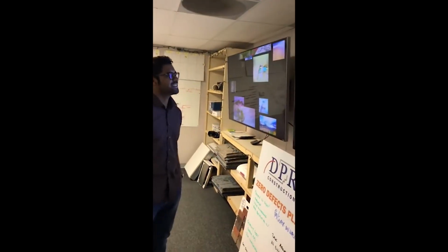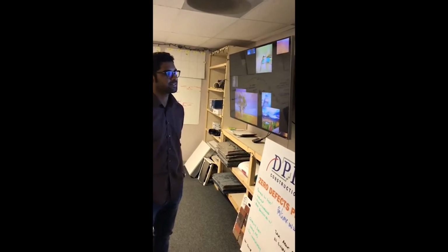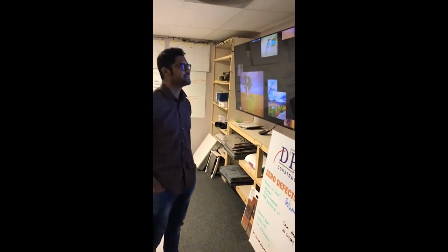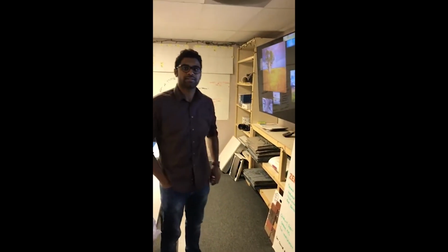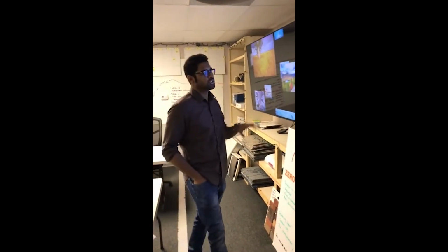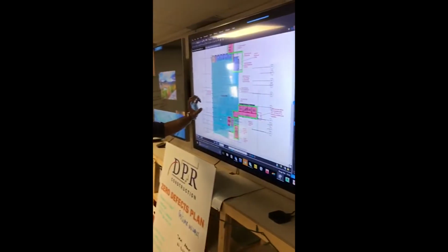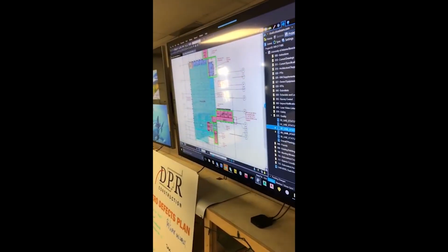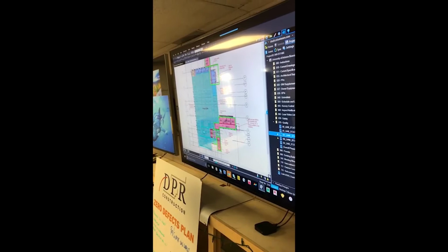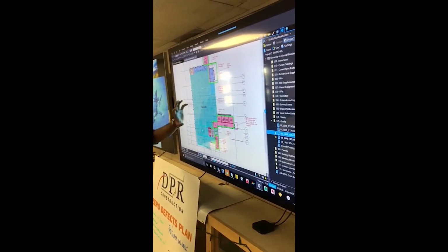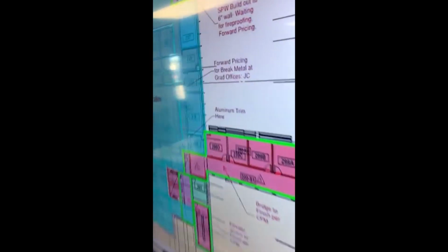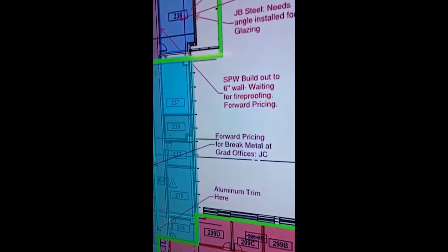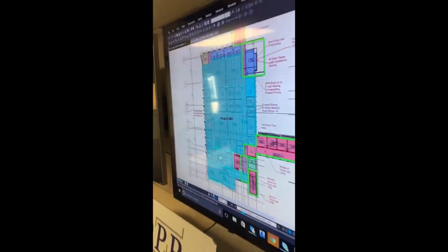So Rizwan, can you show us your idea here? The beginning of it came from BUMCP, but we've adapted it to our job site. So go ahead. This is basically the visual tool for each area, phasing drawings for each area. What we do is put in roadblocks for each part of each week, and have this discussed during the last planning meetings, and how we can come up with a plan.